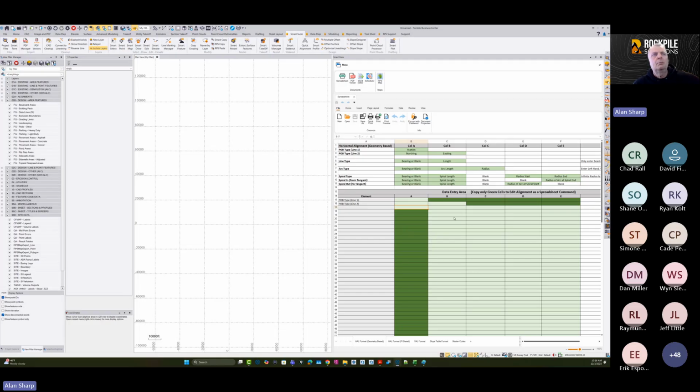And this allows us to build up things like bid sheets and then populate bid sheets with takeoff information. So there's a lot of stuff we can do with a standard templating approach, where we can build a template and then populate information into the template from other reports that we're generating, and then use this to do the calculations of whatever you're trying to do, like end section areas and things like that. So there's a lot of things we can add just because we've got a new spreadsheet tool built into the software.